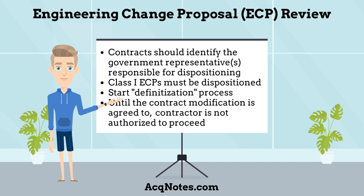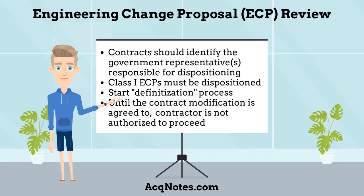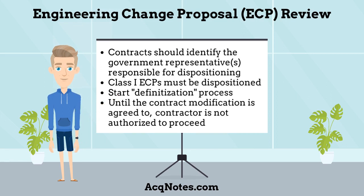Obtaining a pricing proposal, auditing, fact-finding, and negotiating the final price for the change. Until the contract modification is received and bilaterally agreed to by the government and the contractor, the contractor is not authorized to proceed with the implementation of the proposed change.